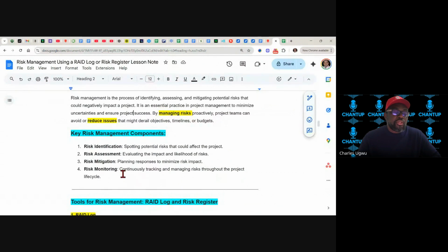How do you do all this? We have a dedicated meeting called the RAID meeting. It's a statutory meeting. There is no calculator or any kind of automation to capture and manage risk. The way we'll be doing it is we have a meeting called the RAID meeting, the statutory meeting we'll have once every week.